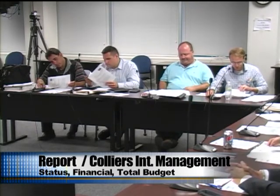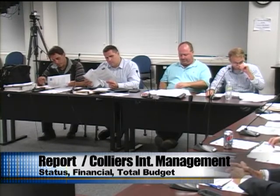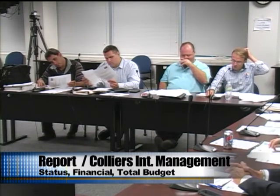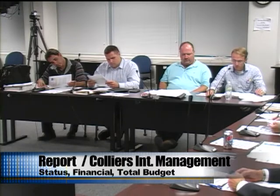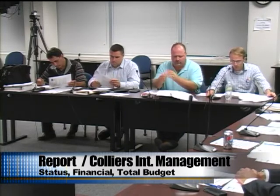I'm not going to go through the progress summary because it's just a reiteration of what Jeff went through. In terms of inspections, we know that the building department's been out there, that Shawmut has been tracking all of those inspections. Special testing has been out there testing concrete and soils. Kevin's been out there doing what he needs to do on a regular basis and what is required per the statement of special inspections, with the exception of some low concrete breaks at some of the piers and the grade beams, which are in the process of getting worked out. Besides that, we haven't heard of any inspection failures to this point.